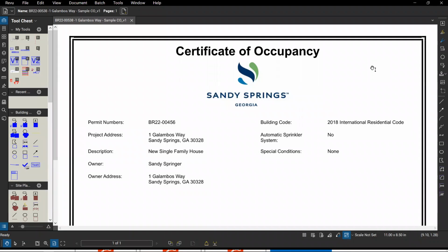But things do come up. I've had people order custom tile coping. That's what they're waiting on before I can sign off on everything. We've seen all kinds of different things in the past 2 years. It's amazing. But for something like that, we may require you to put up a construction fence on the back patio, just to keep occupants from falling into the open ditch that's out there, laying on bare concrete 8 feet down. So there's things like that. We're just trying to maintain safety for the workers, safety for the site, safety for the occupants. That's all we're caring about at the end of the day.